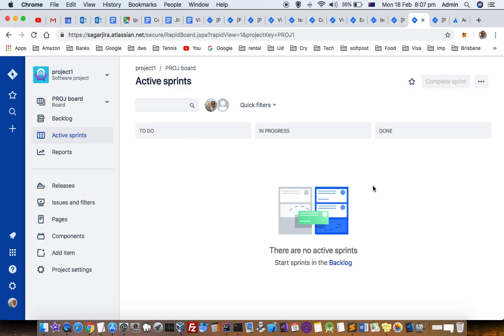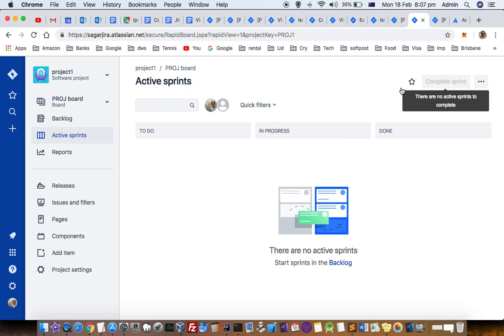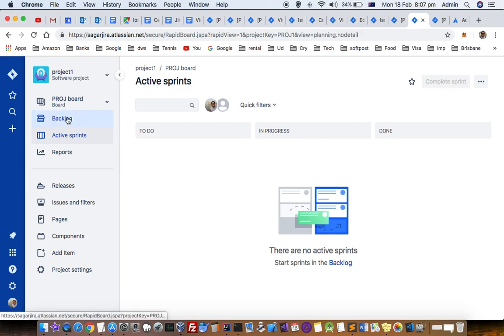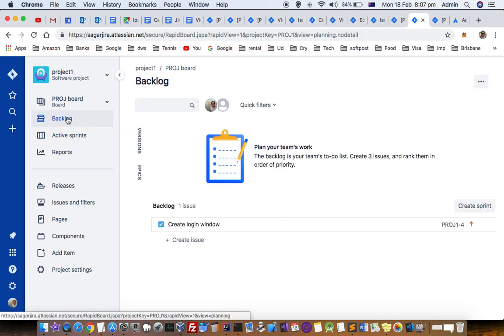You can have parallel sprints, but most of the time you will have just one sprint at a time. So what you have to do is complete the existing sprint first by clicking on this button. Right now there are no active sprints, so I can directly go to backlog and then create sprint over there.